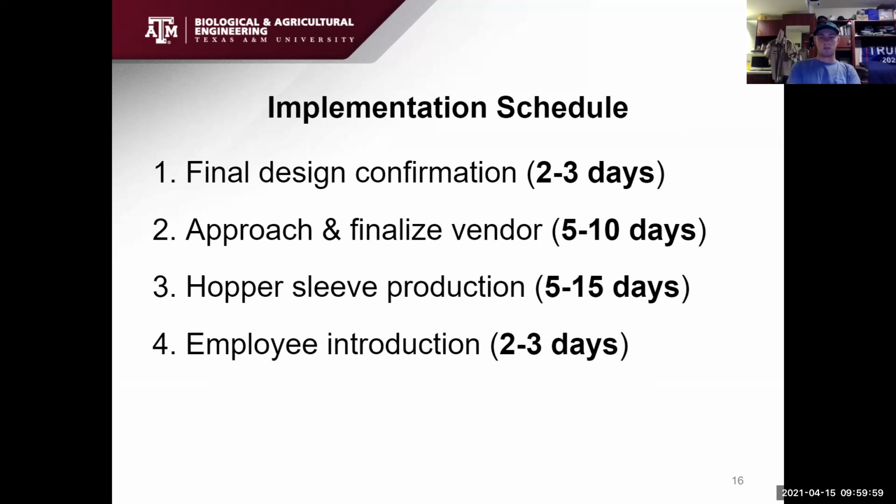And then step 2 is we are going to take the designs to the vendors and see what kind of quotes we can get from them, and bring those quotes back to United Ag and discuss and determine which of those vendors will best fulfill United Ag's needs, and then go forward with that vendor.